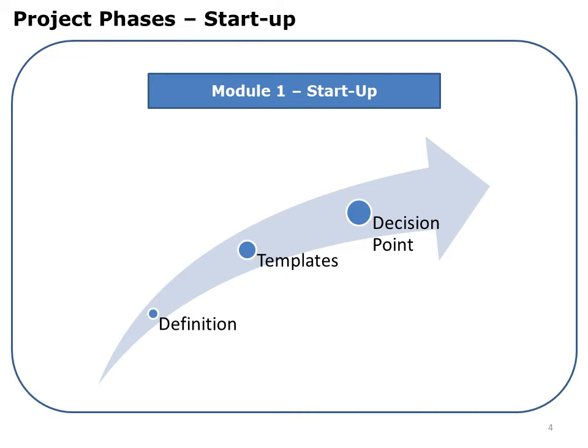Now, in many organizations, a planning cycle is an event where all new initiatives are assessed and a proceed, no go decision is reached. The planning cycle could be quarterly or 6-monthly, or I've seen the case where it's held on a monthly basis. For each initiative, a prioritization team would look at the initiative's estimated cost and benefits, its alignment to business goals or strategy plans, and the risk of not doing it.